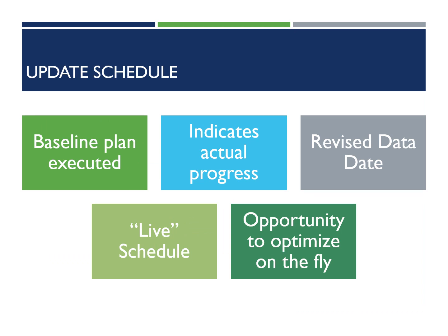Update schedule. Okay, I've talked about this, but we pick a date and we measure the project baseline based on that date at the same time every month, or whatever the cycle is. So the update schedule is basically the baseline plan being executed and in progress. This is where you might hear the revised data date issue. We're just into May, so right now I'm reviewing May 1st update data date schedules.